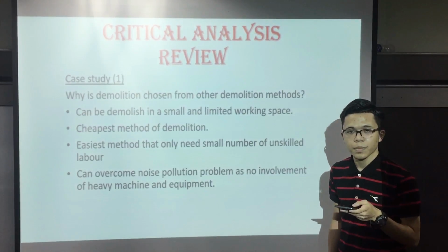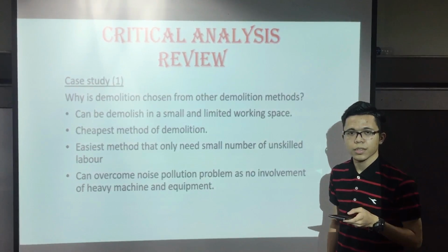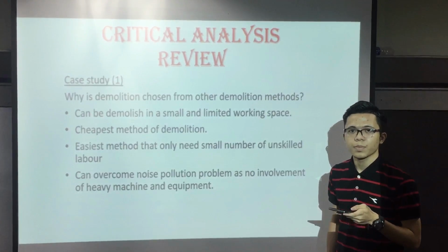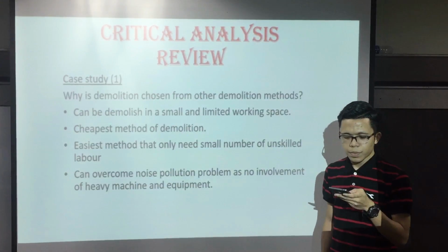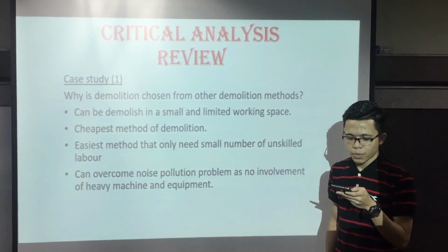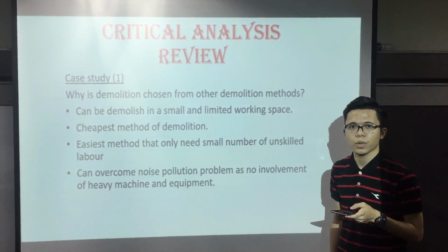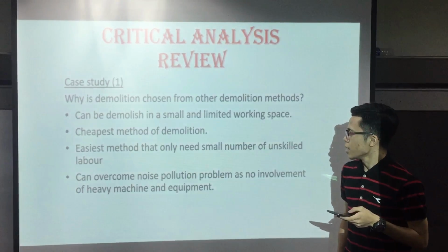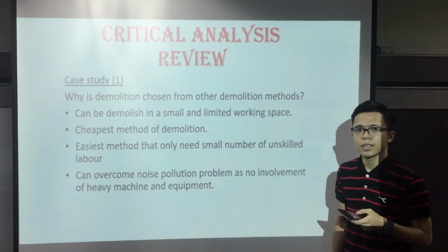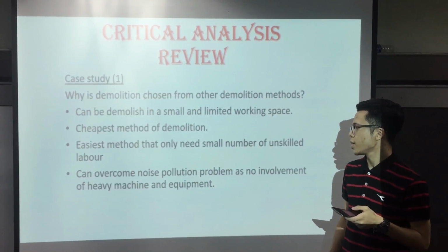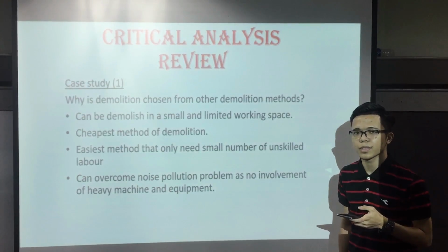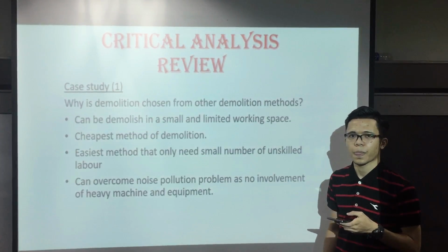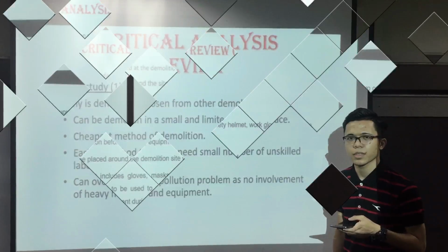Therefore, the hand demolition method is selected as it is the cheapest method, because only simple and cheaper tools are used. Last but not least, hand demolition can also overcome the noise pollution problem as there is no involvement of heavy machines and equipment. That's all for the first case study.